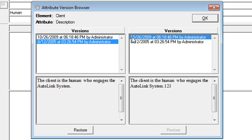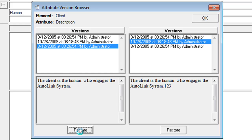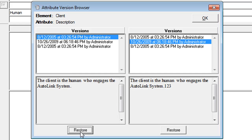You can restore a value by clicking on the one you want to restore and clicking the Restore button at the bottom of the versioning browser. When you restore a version, the date remains the date it was entered, not the date of restoration.